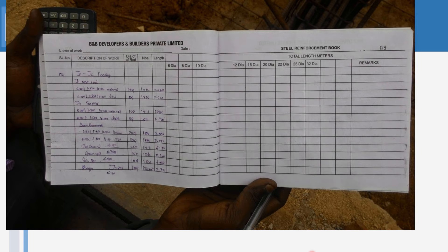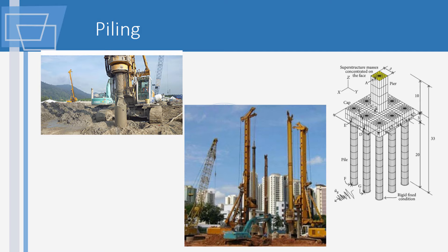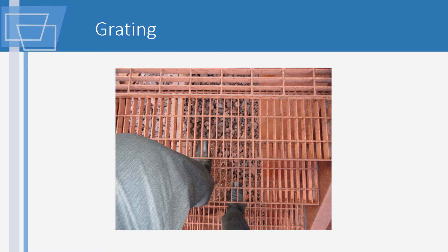Moving to piling: piling is always done in numbers. The diameter of the pile is given, and the pile is measured in running meters. The pile cap is measured in cubic meters, much like any other concrete work. For grating, you specify the type and thickness, and it is measured in square meters, but your orders are ultimately placed in kilograms or tons.